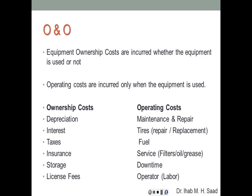Ownership and operation costs differ fundamentally. Ownership costs are incurred whether the equipment is used or not. Think about a truck kept locked in a garage — you're not making profit, and its value will still deteriorate with time due to depreciation. Whether it's working or not, its value decreases. Operating costs, however, are incurred only when equipment is being used — fuel, grease, filters, maintenance, etc. — and are proportional to the amount of use.